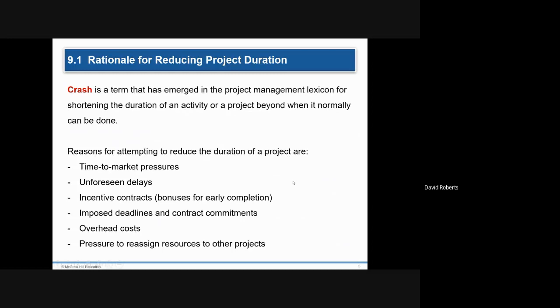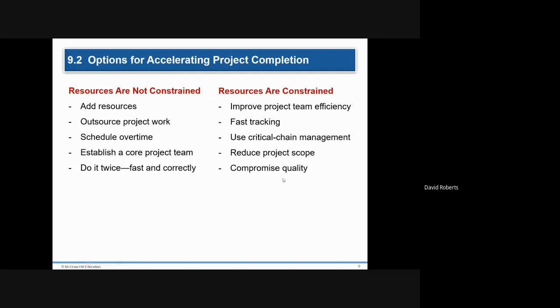And you need to also then assign these resources. Remember, those people, that equipment, those materials can be used elsewhere. And in an earlier chapter, I talked about the fact that they needed a project crashed, reduced, so they could tear down the parkade so they can construct a new building, because that would have delayed the start of that building and it would have delayed the completion of that building. So you can add resources, you can schedule overtime, things along that line. You can still do it quickly and correctly.